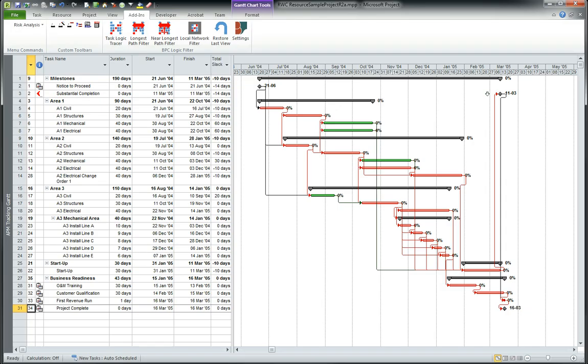The longest path is the driving path to project completion. We find it by first identifying the task that is the project completion task logically and then we find the driving path for that task.